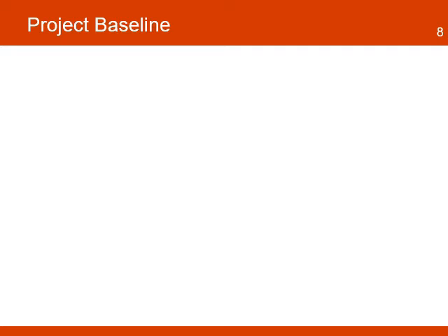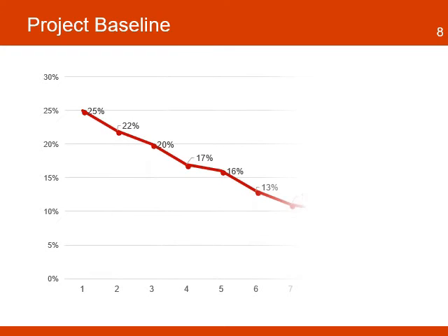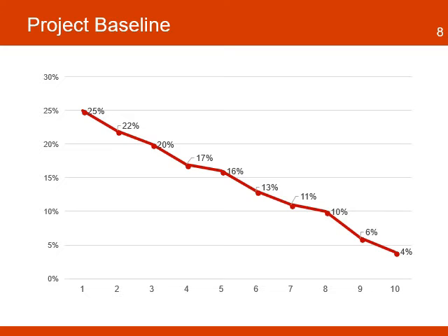The principal focus of the baseline is to collect and analyze pre-intervention data related to the indicators at the goal and outcome levels. It is important to have the baseline values before the project begins so that the project can measure its performance over time. During each data collection cycle, the project will be able to measure the progress it makes, and the project manager can use this information to monitor the effectiveness of the project in reaching its goal.